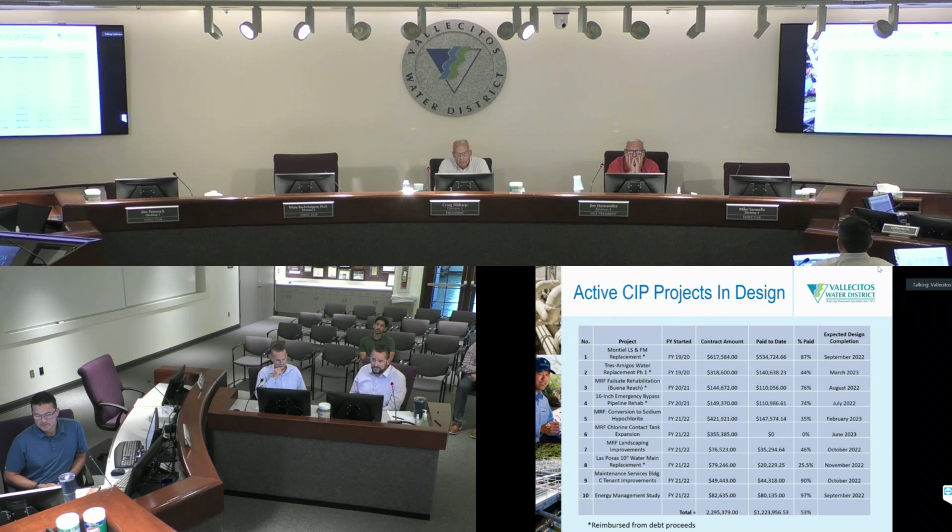Those marked with an asterisk are reimbursed from debt proceeds. And so you can see we've been very busy, totaling nearly $2.3 million of contract design. And of that, we've spent to date just over $1.2 million. So 53% of the contract value we're working towards final design.